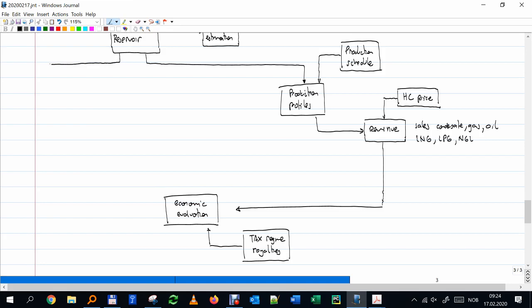Okay, the reservoir might have a rough idea how much I will be able to produce, the volumes, the liquid, but then I have to know how much developing that will cost. Okay, and there is a large uncertainty if to use 10 wells, 20 wells, 15 wells, injection, no injection, what kind of injection, what offshore structure. There are many things. So in this part of the value chain model is where I usually have the greatest uncertainties.